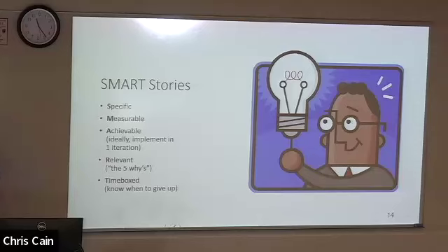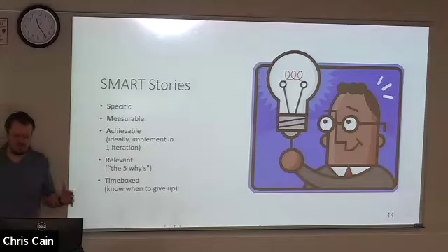What that means is you give yourself an amount of time to accomplish it. If you say this should take 2 weeks of time to finish, to go from start to finish, 2 weeks elapse and you're not even close. You barely made progress. Maybe it just doesn't belong either in this sprint or even in this project. It may be time to go back to the client and say, is there some other way that we can accomplish whatever it is that you want? Because we dedicated 2 weeks to this, we're 2 weeks in and we barely made any progress.